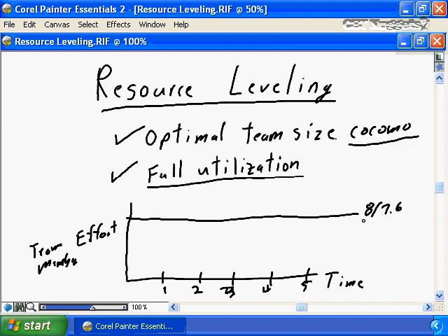If you're dealing on a week basis, it's going to be 40, or again, the appropriate reduction down to 35 hours of available time for the team member. Or if you're working on a month basis, it's going to be 22 average days per month, or again, reduced to the appropriate number of 18.5 available days for your project per unit of time: day, week, month.